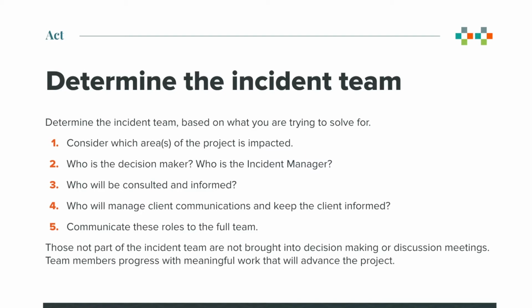Next, you'll determine the incident team based on what you're trying to solve for. So the incident team may change depending on the incident. First, consider which area of the project is impacted. Then determine who the decision maker is and who the incident manager is. Next, determine who will be consulted and who might be informed. Identify the teammate who will manage client communications and keep the client informed of progress.